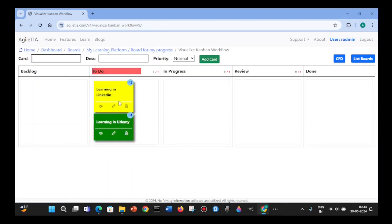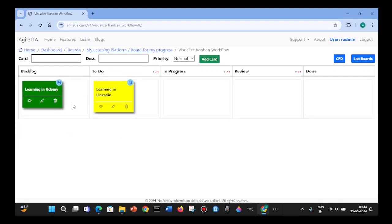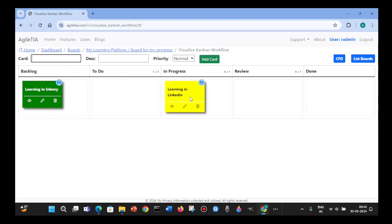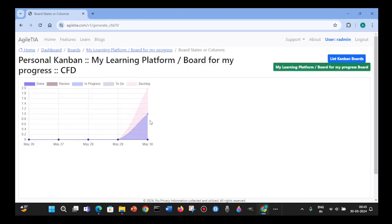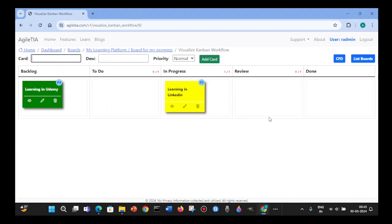If you add more cards than the WIP limit allows, the system will alert us — meaning we are over the WIP limit. A typical Kanban system will honor this WIP limit, so we either move a card back or start focusing and proceeding in the direction we need. We can also see the CFD — the Cumulative Flow Diagram — which shows how many cards are in each column over a period of time. As we move cards, the CFD tracks those changes. This is how you visualize the workflow, apply WIP limits, and manage the flow, which are fundamental Kanban practices. We will cover policies, feedback loops, and experimentation with Kanban boards in the next video.